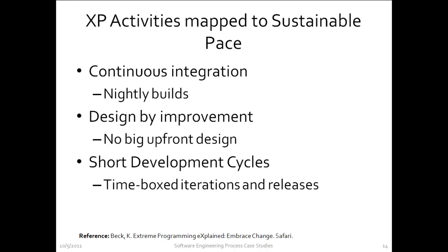In other words, features that were selected for a release or iteration but not completed in time for the release are simply left out for that release or iteration. The thinking is that releases and iterations are short enough that what can't be delivered in a particular cycle will appear not too long after.